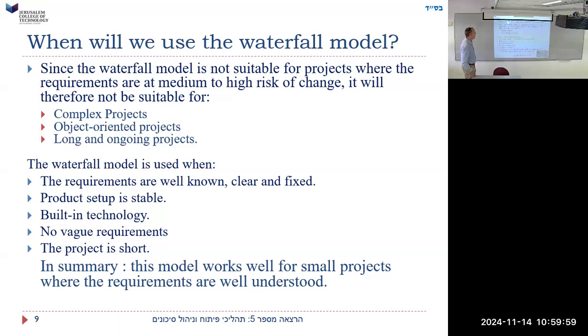Well, the good thing about the waterfall is in the early stages we can already know how big the project is going to be. We're not going to come up with lots of changes in the middle. So we know how long it's going to take, maybe, and we know how much money it's going to cost. So we can already estimate costs from the beginning, and then we are able to participate in a bid with other companies to get a contract. If there are several companies that are all interested in the same contract, we need to say how much it's going to cost, and they might take the lowest bid. Well, we want to make an accurate bid, so we need to first plan out what we're going to do. If we do everything as we go, then we have no way of coming up with a budget in the beginning. So that's what I said then.